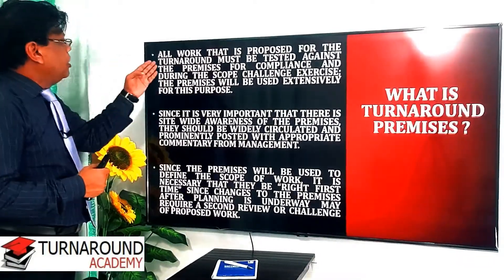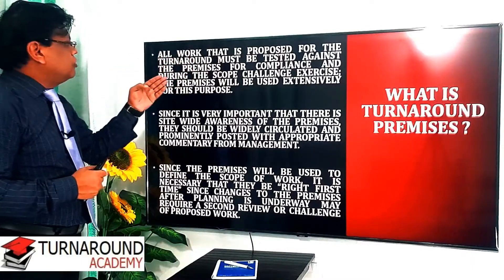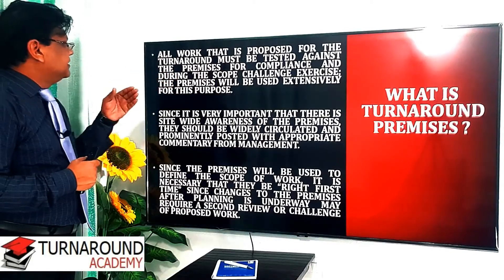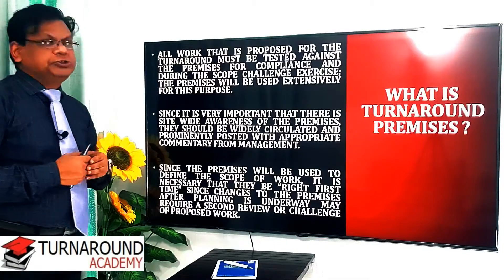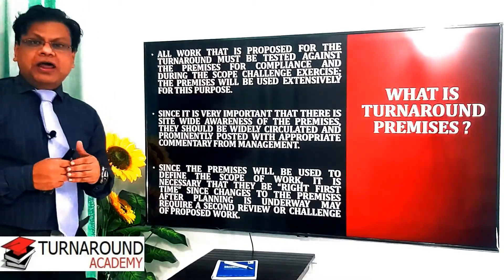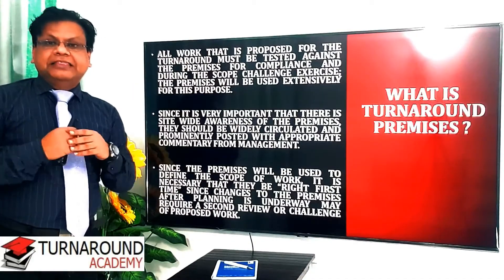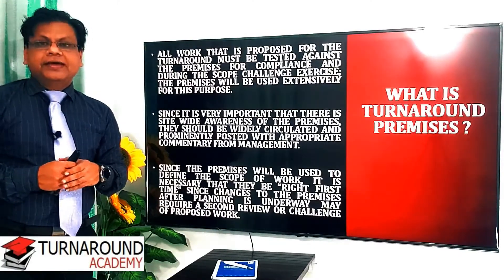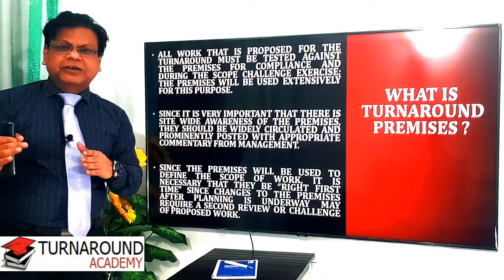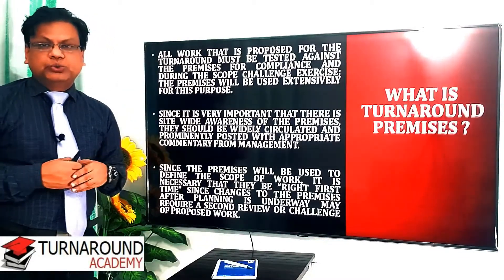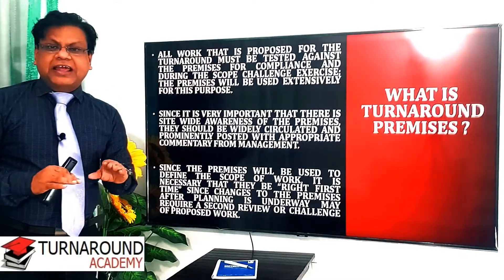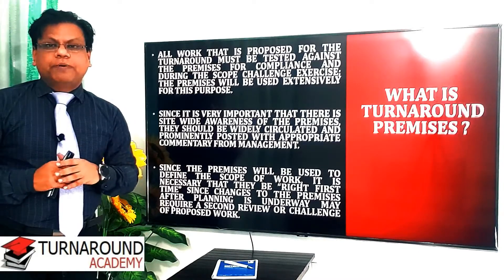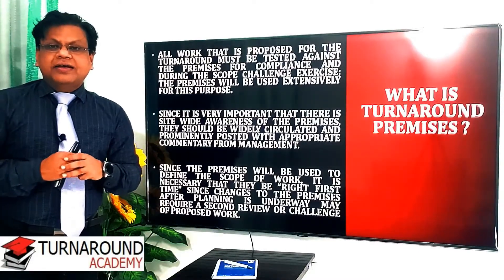All work proposed for the turnaround must be tested against the premises for compliance. During the scope challenge exercise, the premises will be used extensively for this purpose. While you are doing the scope challenge session, the policy decisions in the premises need to be considered. Management has given direction and policy decisions in the turnaround premises, and you need to consider these while doing the scope challenge.